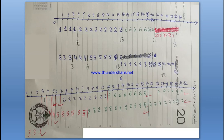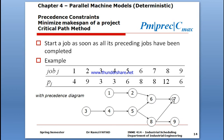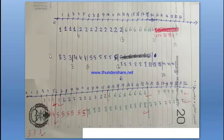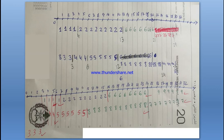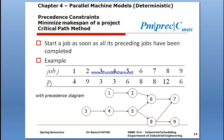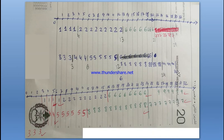The remaining jobs to schedule are six, eight, and nine. Job six must wait for both job two and job five to finish before it can start. Then we schedule job eight, then job nine. Job nine finishes at time thirty. Job seven would finish at time thirty-two, since job six requires job eight, and job eight requires twelve steps, finishing at thirty.